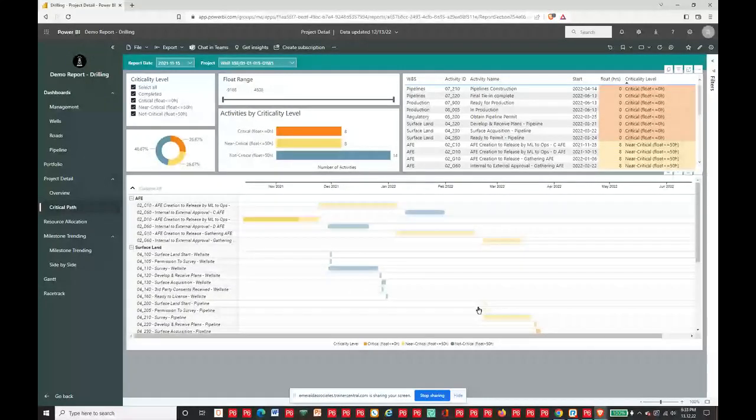I always tell people, and I know I do that when I'm involved in projects, I do tend to work with a number of turnaround projects. Any project, you're not only going to want to focus on what is critical now, but what's just sitting off the critical path. Because if those slip a little, they can sure impact things, and not in a good way. So you want to know what those activities are. That information is available right here.